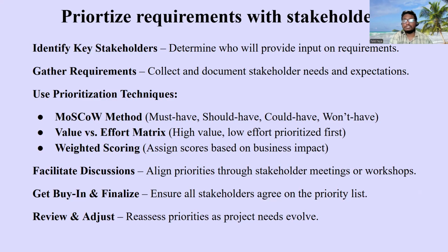Next point is should have. Should have is nothing but it should be there, but it is not a must. Must is the core value, core product, core feature. Should means it should have. Could means it can or it cannot have. It is basically used to delight the customers for their desirability. It is optional. Won't have means it doesn't matter, it's not a mandatory one, right?